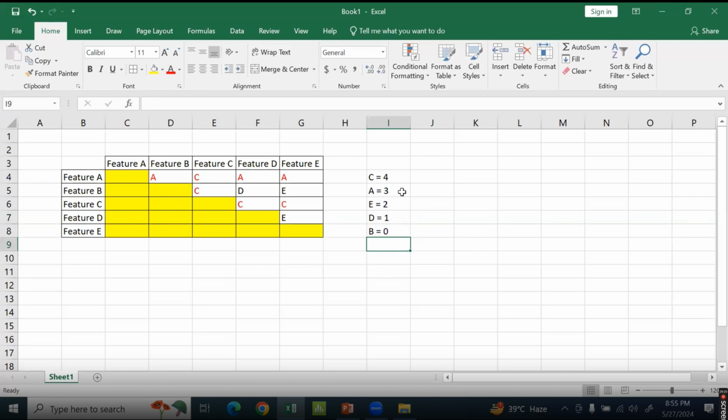We will say, okay, since whenever we did a paired comparison, this C feature happened to be the winner on most of the occasions, that will be my first priority. Second, third, fourth. That's what we call paired comparison. It's compared between 2 different features here. So is it okay and clear? That's paired comparison. But you only do it when the elements are fewer. Otherwise, it becomes messy. You don't do it with bigger, larger sets. It's meant for smaller groups.